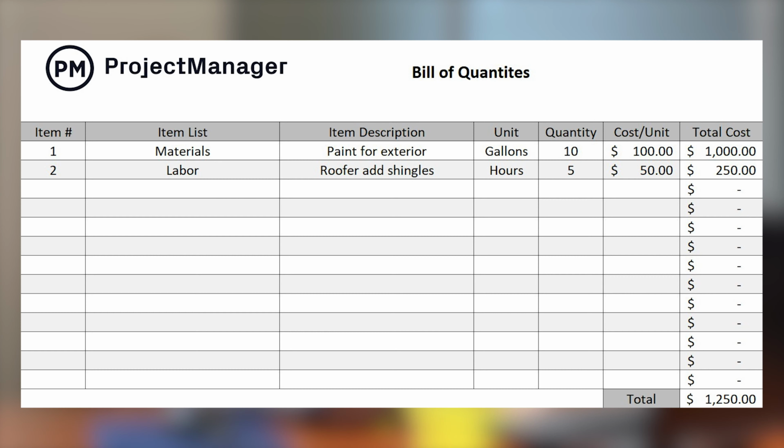The other thing, as we mentioned, is getting the estimate of the money that will be required. This is usually captured in a document that we call the bill of quantities, a BOQ, that is prepared by a quantity surveyor. In the BOQ, you have the figures broken down that tell you that at every stage this is the amount of money that you will be spending.